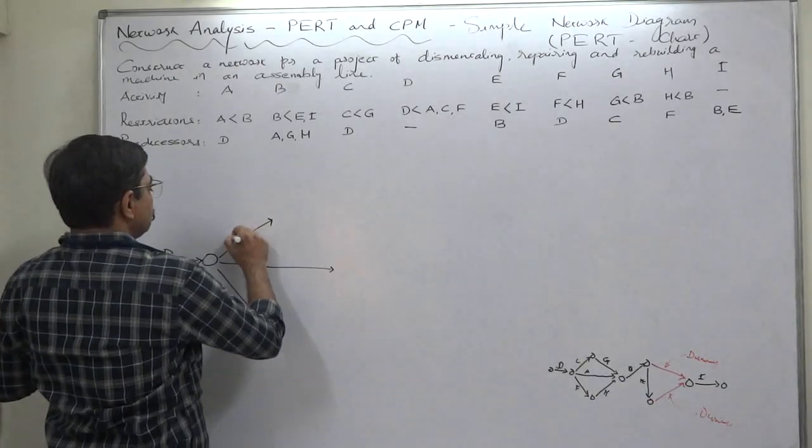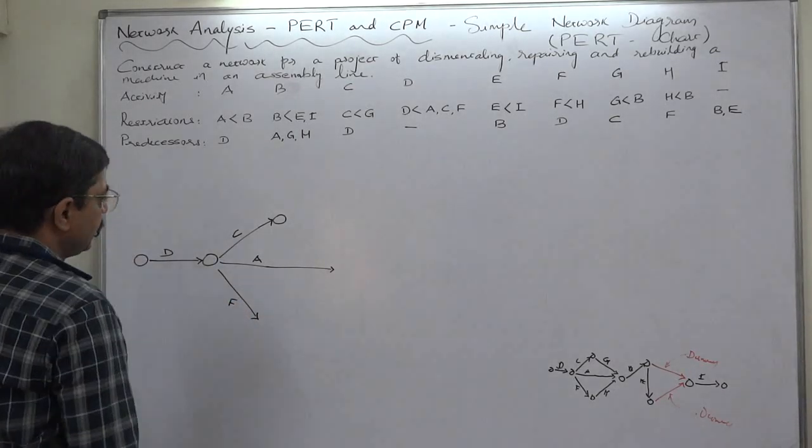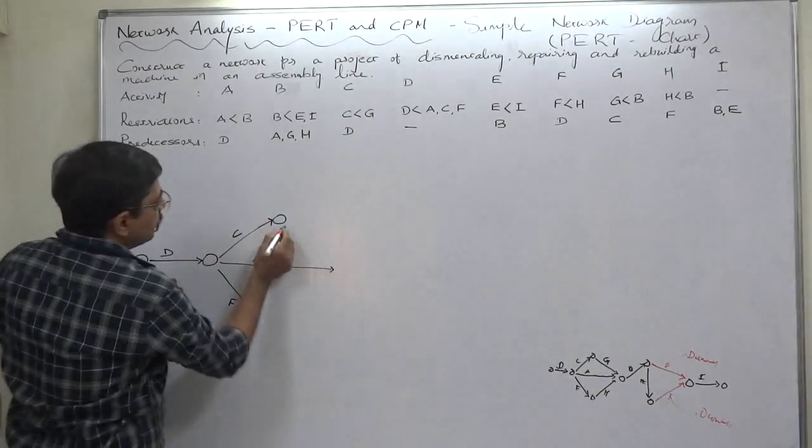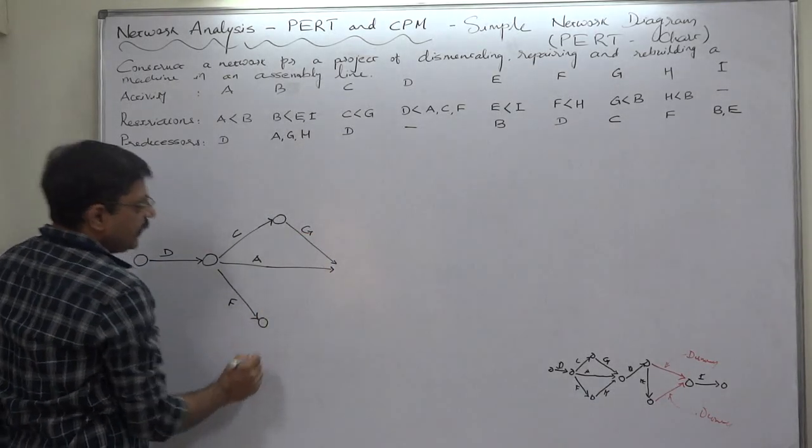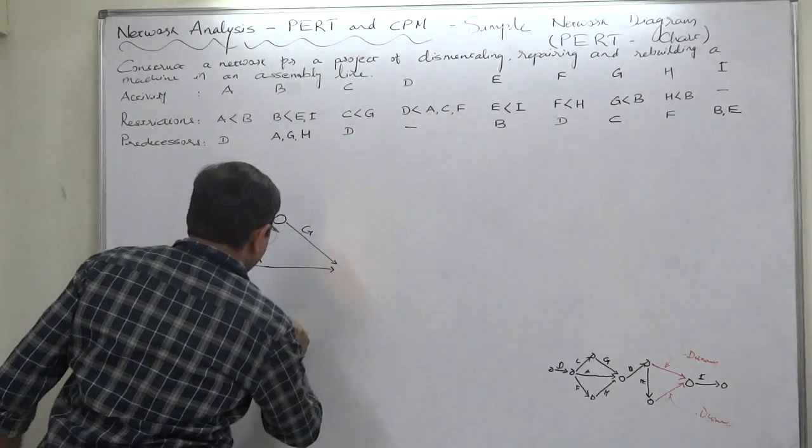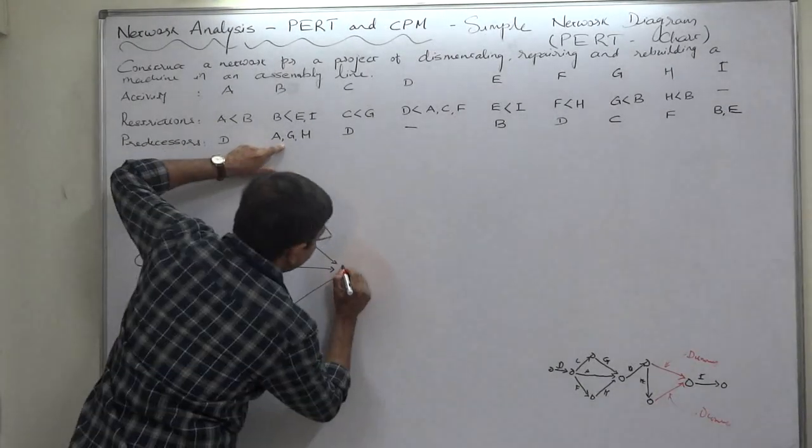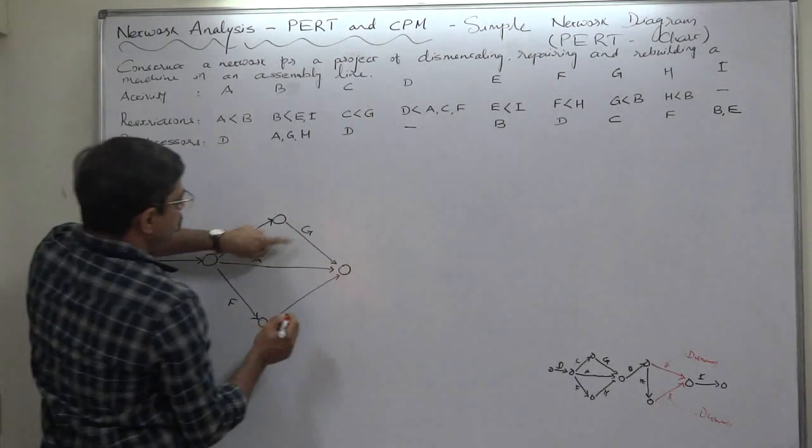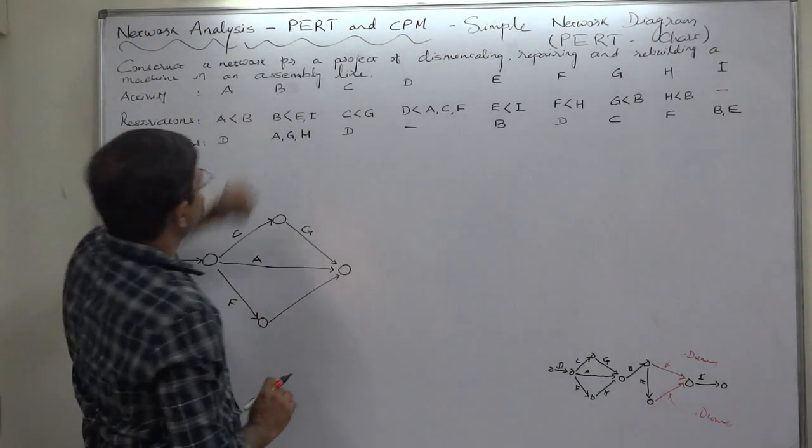Now we can name this as C and this as F, so that C will become the predecessor of G in this way. F will become the predecessor of H in this way. And in this way we shall have the merge event, the event merging A, G, and H. And they become the common predecessor of B.